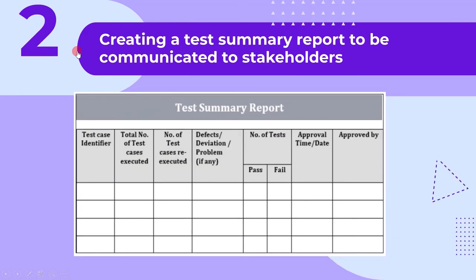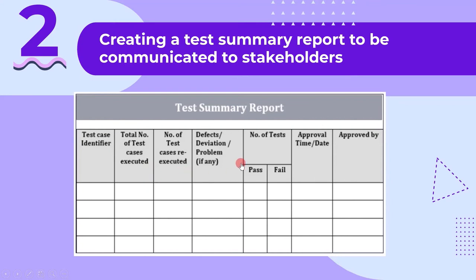The second activity is creating a test summary report to be communicated to stakeholders. Since by now all the test activities are over, we create a test summary report. A typical test summary report includes test case ID, number of tests executed, number of tests re-executed, defect ID, pass and fail status, approval date and time, and approver name. This report is then shared with the stakeholders.